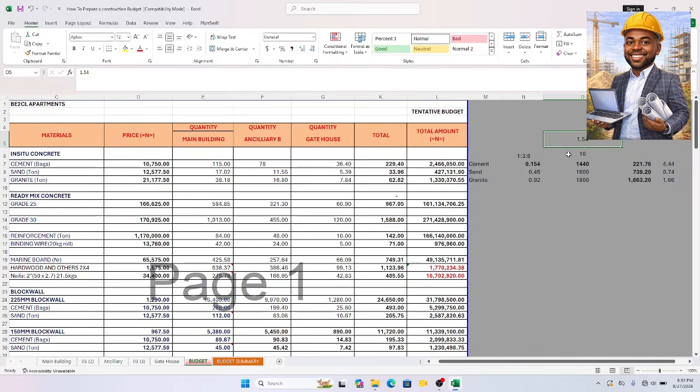So if I have a particular concrete, I've mixed it together without water, it is always more than when there is water, because when you add water, it shrinks, right? So that is why we have volume of dry weight. So the dry weight is 0.54 times the wet weight. That's why I say 1.54.